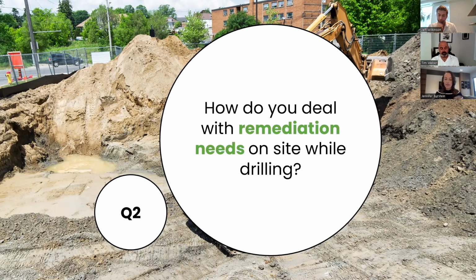You then end up having to blend it in with your bulk excavation. Often it doesn't dry in time and it's a big sloppy mess. And so I think more so nowadays you're seeing trucking needs at the early stage where you're removing the spoils and binning them and then trucking them off site even before your excavator shows up at the site for bulk excavation.